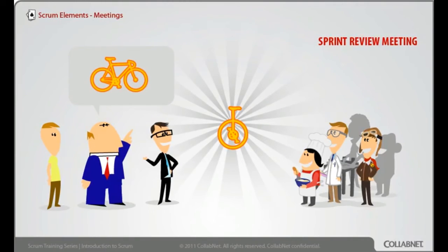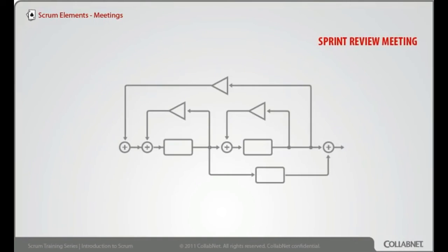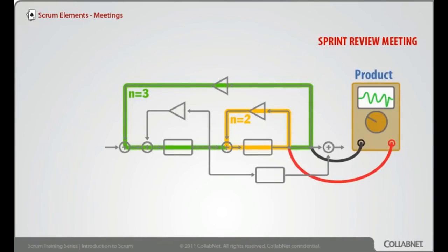A lot of times the feedback is, hey guys, you did what you said you'd do, but now that we see it, we realize we need something else. And we couldn't have known that until we saw the wrong product. People seem to need a piece of functioning software to react against before they can specify what they really want. Regular sprint review meetings provide a feedback loop about the product and its requirements.